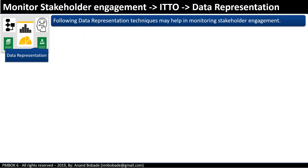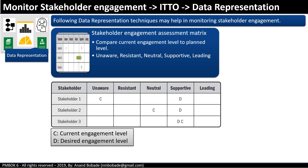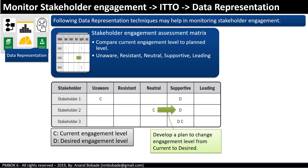Under data representation techniques, the stakeholder engagement assessment matrix is used to chart the progress in bringing the current level of stakeholder engagement to the desired level. The project manager will develop a plan to change engagement from the current to the desired level.